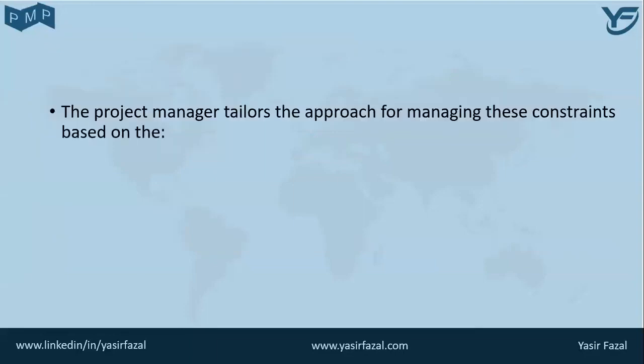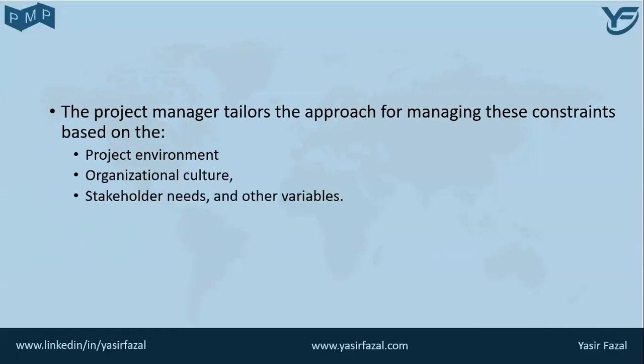In tailoring project management, the project manager should also consider the varying levels of governance that are required to be tailored, and within which the project will operate, as well as considering the culture of the organization. In addition, whether the customer of the project is internal or external to the organization may affect the project management tailoring decision.